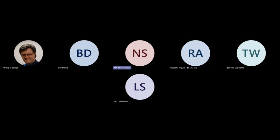So I see here, should value points be done at story level or epic level? So the answer is that it's whatever item is in your backlog. Every item in the backlog should have value points, but sometimes it may not be practical to do it at the story level. If your stories are too small, then I would say it should be done at the feature level or epic level, because you will not be releasing